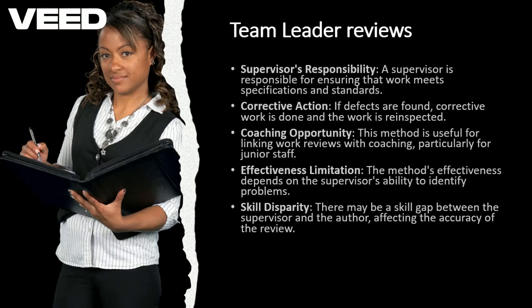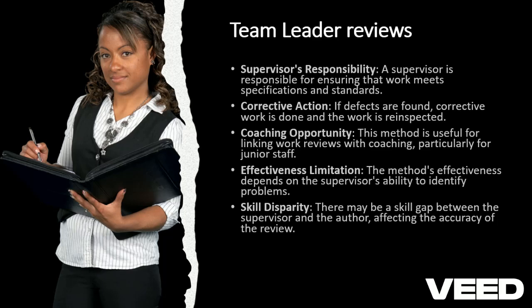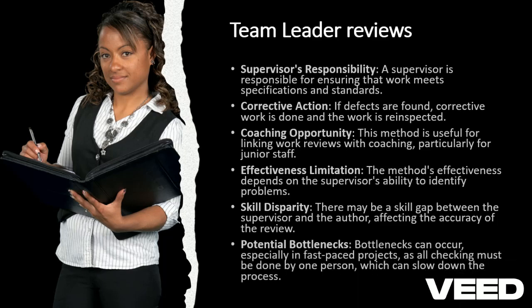And just like is the case with the self-checking, it is only as effective as the skills of the team leader or the reviewer again in this case. And we will have instances, and it is actually prominent, that when you have a multi-skilled team, meaning you have different parts of the project requiring different skills, it's possible that the team leader may not actually have the skills that are required to review a particular subordinate's work.